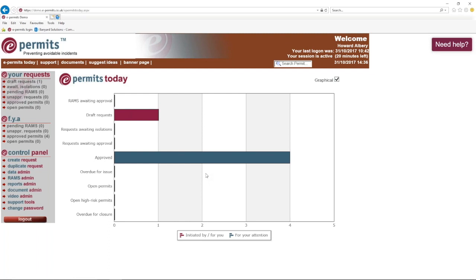There is always the ability within the system to assign different levels of approval. So if I'm the person that's supposed to approve that confined space permit, but I'm off sick, then someone else can also have the responsibility for signing off those permits as a backup, or someone can have overall authority and can sign off any types of permits in situations where you're stuck getting the sign-off done. So all of those issues about leave, holidays, sick leave and so forth can be covered off within the system by putting levels of redundancy in terms of the permissions.